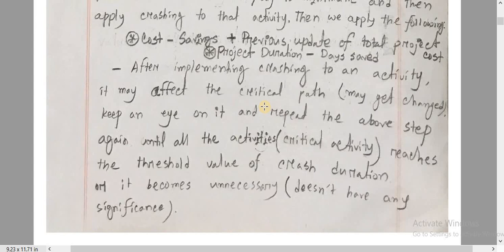We repeat until all the activities on the critical path reach the threshold value of crash duration, or the total crashing process becomes unnecessary. So we need to change the iteration accordingly.